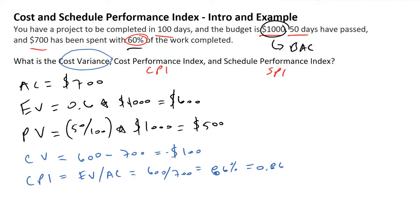You can also have a CPI that's greater than 1, and in those cases, that means that for every $1 in paint that you've spent to paint a room, you're actually able to get more than $1 of value out of painting that room in that scenario.